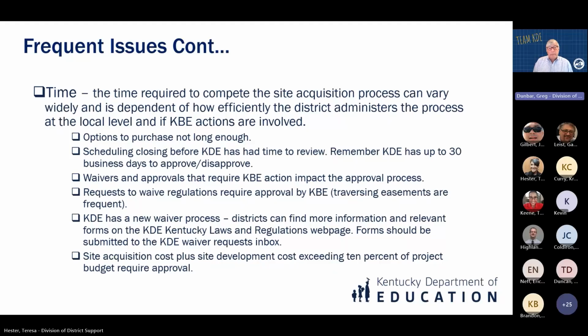As I've alluded to, the time required to complete the site acquisition process can vary very widely. It's dependent on how efficiently the district administers the process at the local level and if KBE actions are involved. We recently administered a relatively simple acquisition during the month of August. However, the board was highly motivated. It involved 2 special board meetings. We recognize that many districts don't want to do that.